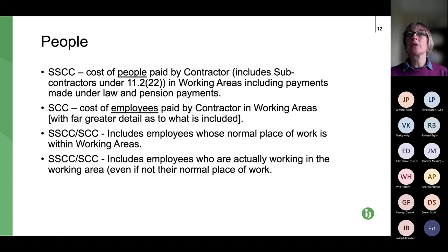So very, very similar to the schedule itself, but the lists of payments, so, you know, the holiday payments, etc., that we talked about for the ordinary schedule is more limited for the shorter schedule. Probably, logically so, because of course, if you're using the shorter schedule, it's in limited circumstances. It's usually going to be for compensation events for options A and B, i.e. your fixed price contract. So if we can have the next slide, please.